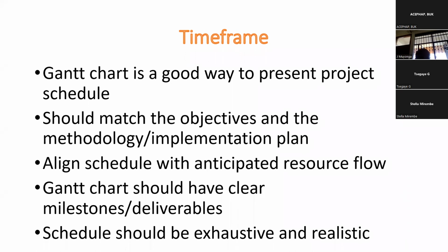The other important aspect is that you should be realistic. Time frames need to be realistic, and if your time frame is not realistic, that alone is adequate to reject a proposal. It shows that it's not feasible. The call is for 2 years. You have an activity which requires 5 years, and you try to squeeze it in 2 years because that's what the call says. The evaluators will easily see through, and that will be a problem for your proposal.